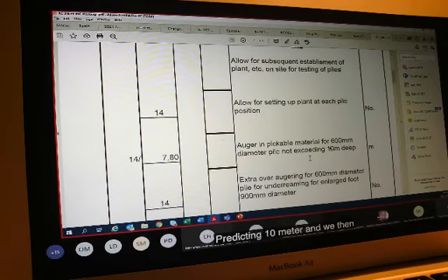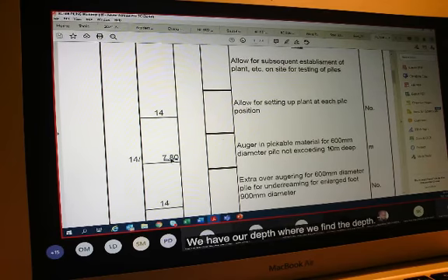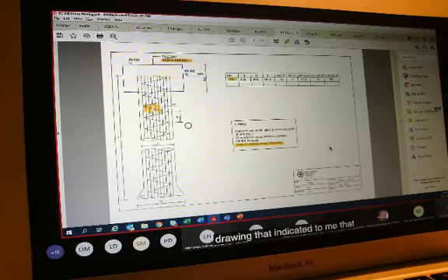It tells us we would be working in sections not exceeding 10 meters, and then exceeding 10 meters, in intervals of 10 meters for the excavation for piles. So when we excavate and say that this does not exceed 10 meters deep,